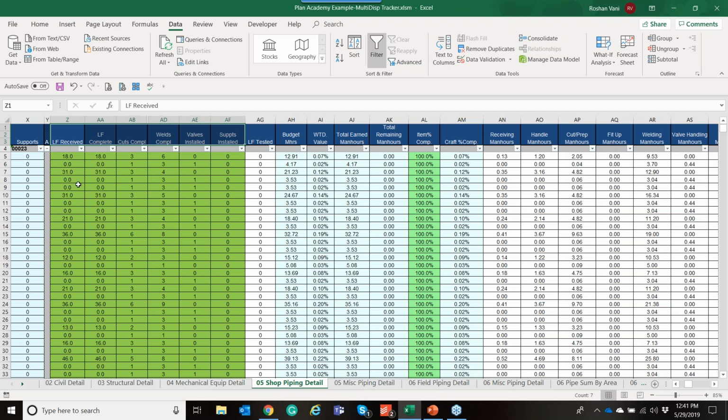And as we calculate widgets installed, as I like to say, or units installed in the field, total number of linear foot installed or put in place, number of cuts done, welds installed, we're calculating an overall percent complete by ISO, which is calculating the earned man hours on that task. And then we can take that and, for the overall project or for this particular discipline, aggregate those numbers and then run lots of different metrics.